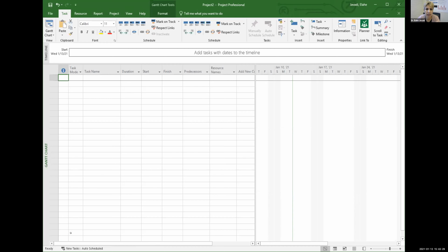It tells you that if something changes about a given task, all related tasks will be updated accordingly. This is a nice feature, and in most cases, you want to have this feature on auto schedule. So an example, like if a project is ahead or behind and you add or remove days, it will shift everything after that. Exactly. You? Absolutely. Okay. Automatically changes the start time, end time of everything that depends on it.